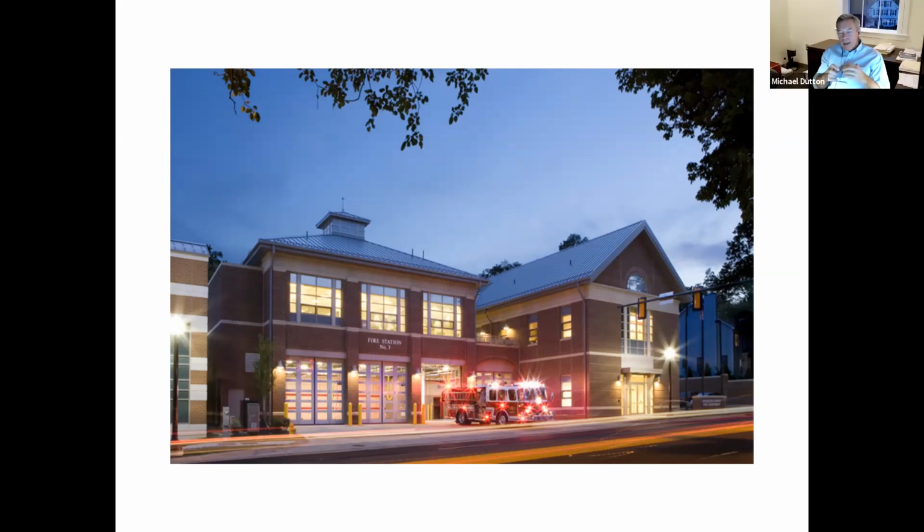Yep. So Brian, tell us a little bit about what your next steps are and what we need to do. I'm just waiting for you, being the committee or town, to authorize me to go to a professional cost estimate phase. That's our final phase and completes the package. That professional cost estimate probably will take 3 weeks. We get into a queue. I outsource that to an estimator out of Newton, Massachusetts. So I give him a call and say I'm ready, but then he has to tell me that I'm in his queue and he'll be able to get to it depending on how many he has in front of him. I haven't talked to him recently, but typically he could get something in and out again in about 3 weeks.